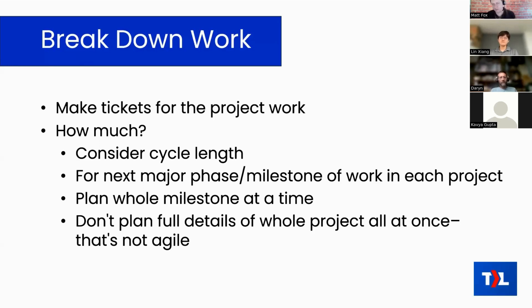Now, I know that in terms of selling the project, the customer kind of expects a certain scope. You're going to set a budget, you're going to sell a project, so there is going to be some work that needs to be done. I would say, however, especially for projects that are more uncertain, or just totally custom one-off projects, it's preferable to split that into multiple small projects.